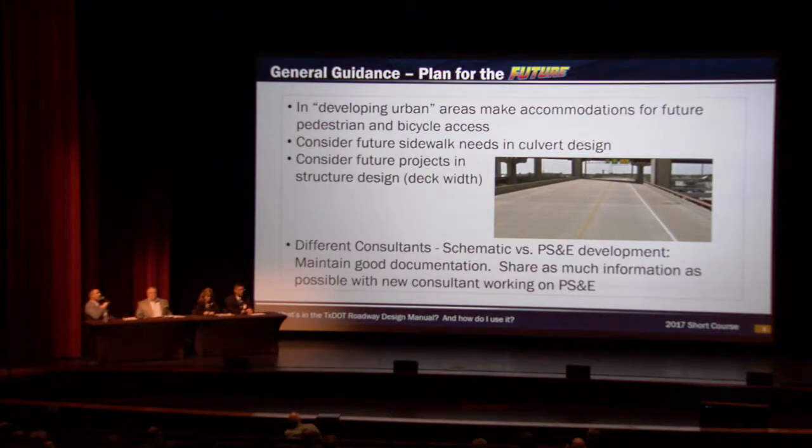Also, something else that came up during lunch, and we may not be able to get to this, the slide at the very end talks about some tips on PS&E, but it's relevant here. If there are these types of changes during project development, specifically related to either project limits or the scope of work, be mindful of what that might do to the STIP status of the project and the NEPA document.